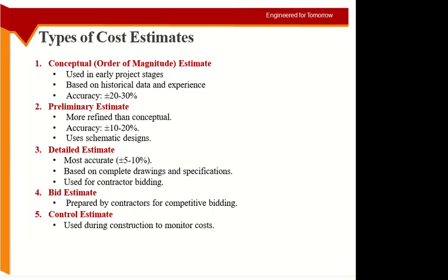Okay, so the bid estimate may show excavation cost this much. In the control stage, you may look for, okay, this was a total cost of excavation, from this much is for excavator, this much is for the operator, this much is for the fuel. So in the control stage, you can go for even smaller items as well, or people usually go for smaller items as well. Why?